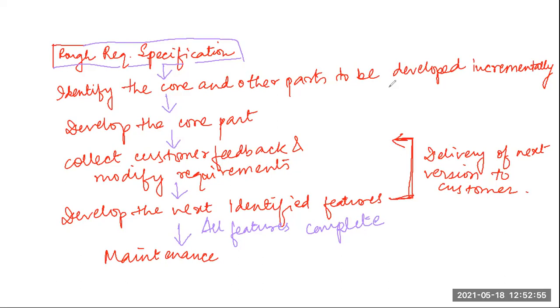Okay, so the request to change the product entirely or major features after the final delivery will be reduced, because with each and every version we are giving unfinished little versions to the customer. They are checking, testing, using, and giving feedback. If they want some change requests, they say so, and we incorporate those. Again, we are delivering. So what it will reduce is the major changes that needed to be done when finally delivered to the customer. So this will help in reducing that.